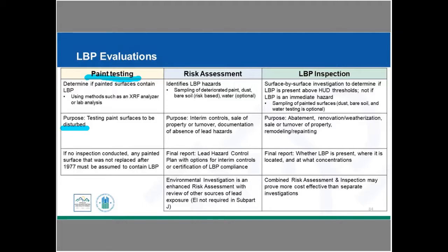We could, in this case, choose to, instead of bringing in testing, simply go ahead and make the presumption that those painted surfaces that we are impacting do contain lead, and we're going to treat them as lead-based paint, so we're going to use safe work practices. So we would not be doing dry scraping and other things. We would treat this appropriately, and then, of course, we're going to do clearance testing as part of this to make sure that we have not created a hazard as part of that work. So that's for up to $5,000 in our hard cost calculation that Chris was showing us earlier.